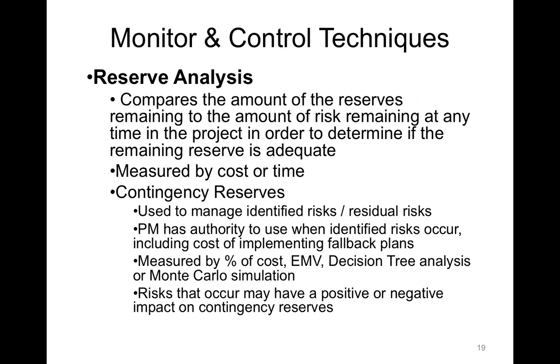But also, we don't want to have too much money in the reserve. If we're close to the end of our project and we've hardly used any of our reserve at all, then we really need to release those funds so they can be used more productively.